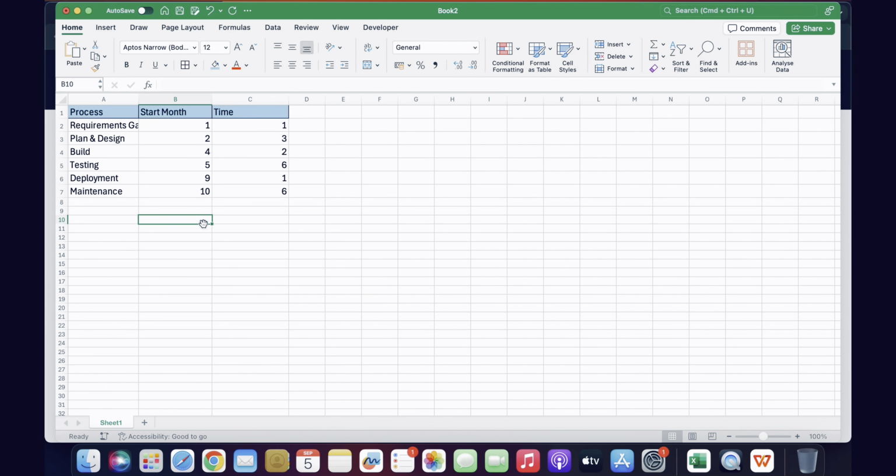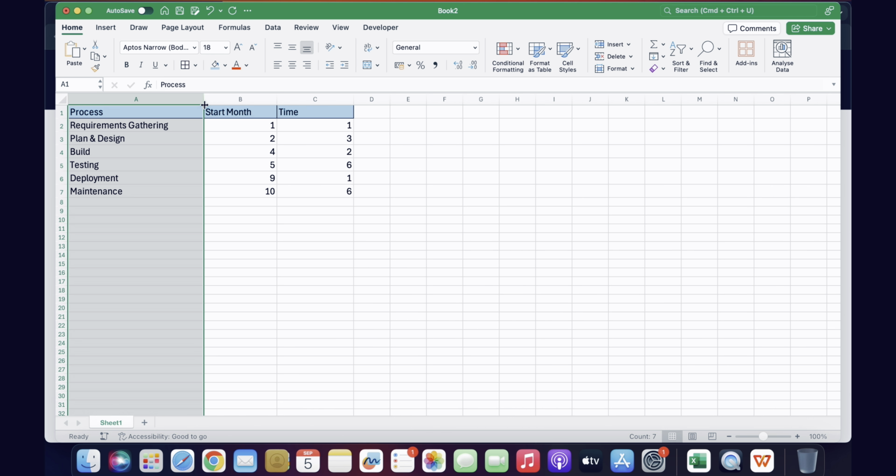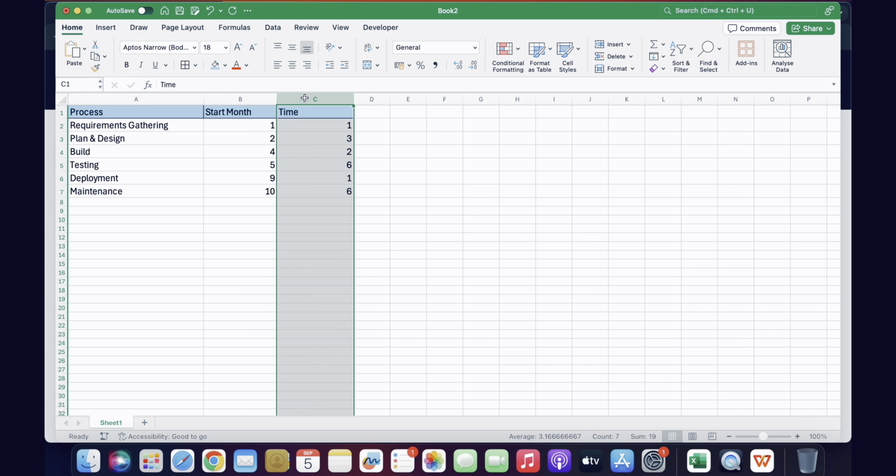I have listed all the different phases of software development life cycle, for example, and I'll talk about that in this tutorial. Similarly, you are supposed to identify all your essential project tasks and then make a list of what needs to be completed and how long each task will take to complete. Then identify the relationship between the tasks. For example, you cannot test a code until the code is written, right?